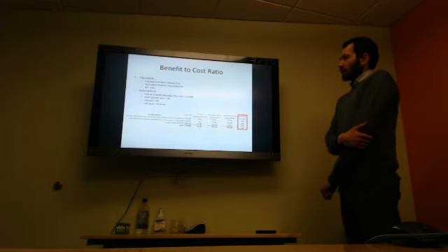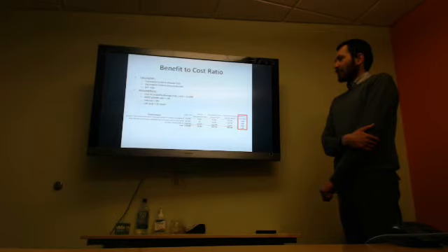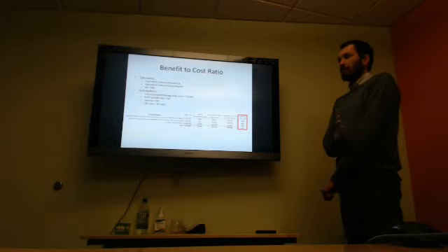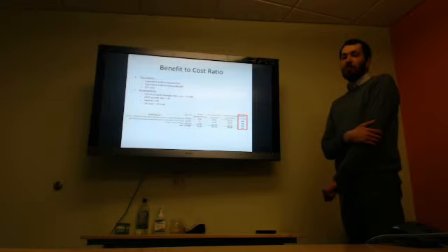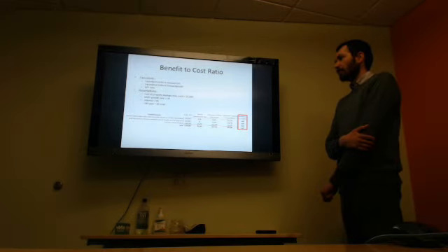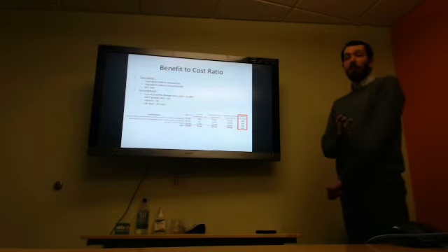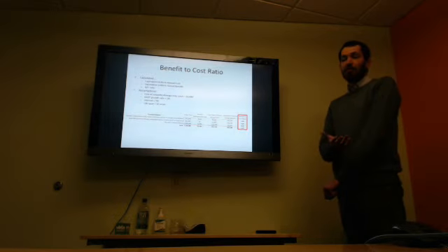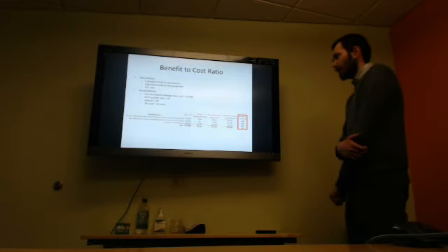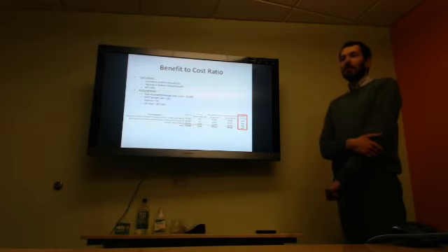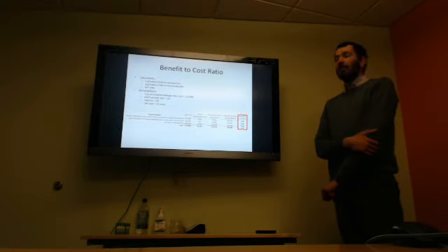And then I came up with cost estimates. And so my cost estimates were, to install the mini roundabout was about 50,000. Could be more if there's more landscaping, but just installing the mini roundabout would probably be about 50,000. And then the road diet is only about 20,000 because it's just a simple improvement. It's mostly striping. It's a great thing about road diet is there's not much to change besides just striping the roadway. And then finally, providing a raised median is going to be the most expensive improvement at probably around 100,000.